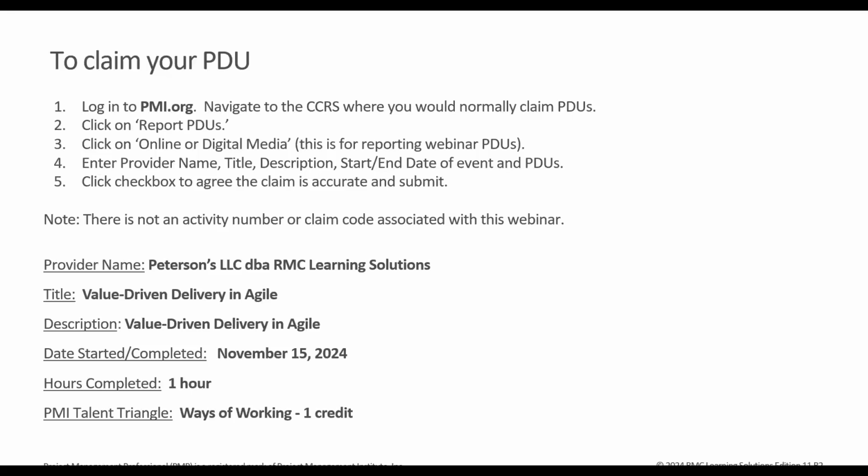So the iteration review is going to happen right after that time-boxed development period. Whatever increment or full deliverable was developed, that's when you're in the iteration review, you're presenting that. Now, again, I'm giving a generic explanation of this, but you're delivering that increment to the stakeholder, to the end user, for feedback on that particular increment that we just developed.